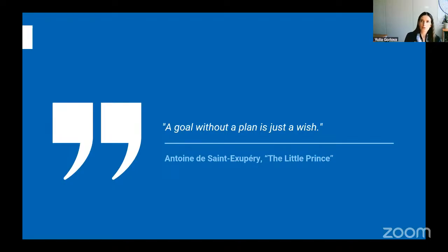suggest that they take the structure of the decommissioning plan from SRS-45 and try to fill it in with the existing information about their facility, just to see what information you already have and what is missing. That helps to then create a certain plan for the future to steadily come to the phase of decommissioning, with expectations of what else you need to prepare, and that really helps in the implementation phase.